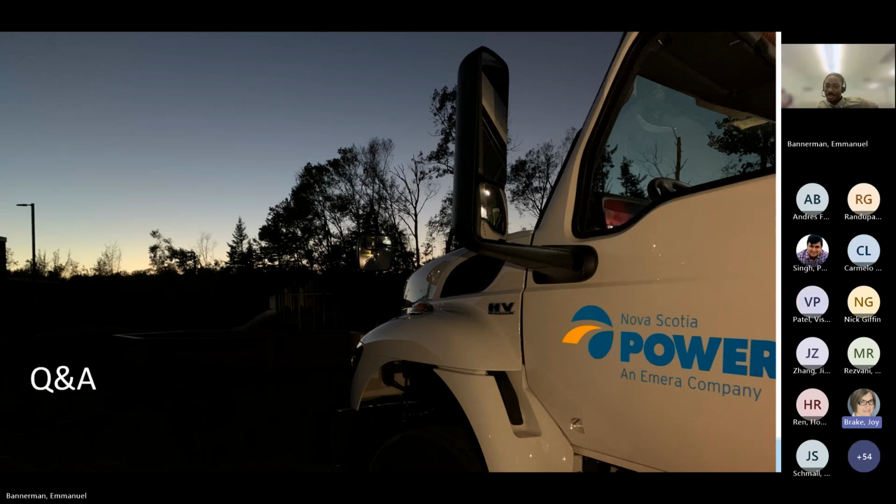What's the process to handle those updates for the PSSE and PSCAD model? So say if it's a Nova Scotia Power project and we're actually the generator owner as well, we put it into our contracts with the OEMs that they will provide PSSE, PSCAD models for X number of years. Once they're outside of that, because we have some plants on the grid where we don't have that, then we have to go pay to get it, which would be the expectation that the GOs will have to do that.